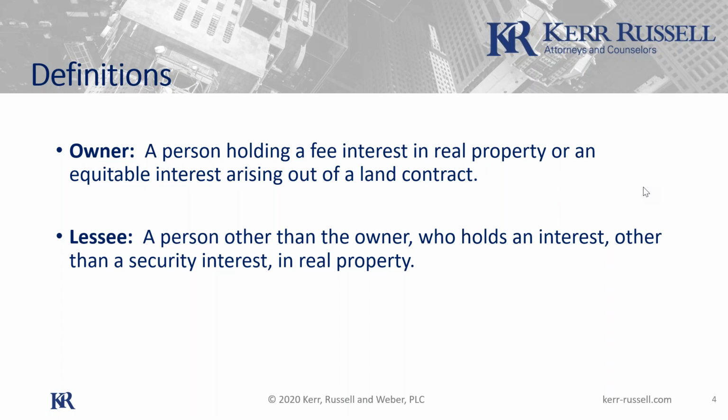So that renders your lien a lot less valuable, because if you were to foreclose on the shoe store, you'd have to take up the balance of his lease, have to pay the landlord the rent, and you wouldn't get his inventory necessarily. So now you just have a space in a mall, and you're a plumber, or in our case an electrical subcontractor. That doesn't really do you a lot of good. And this can be quite disheartening to clients when I inform them that their rights against a tenant aren't as great as they would be against the fee simple owner. So I wanted to mention that.